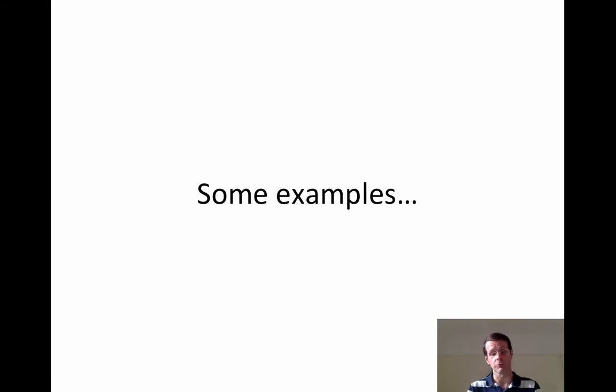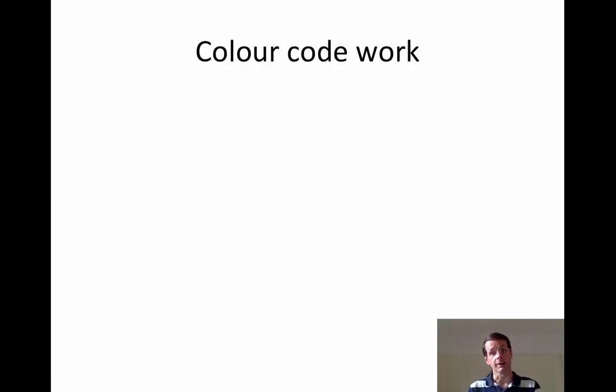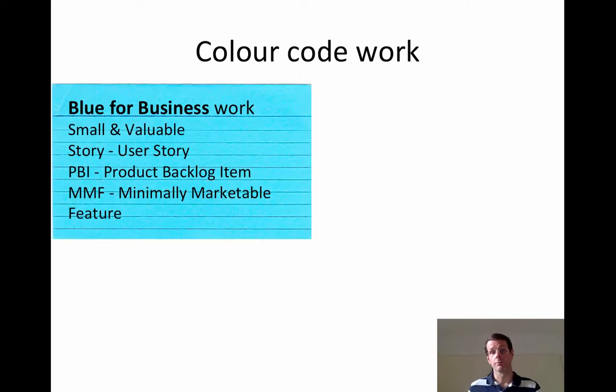As I said, here are some examples. I like to color code work. So I put business-facing work on blue cards. Blue work is something that means something to the business. It has business value, business benefit. We try and keep these pieces of work as small as possible. Some people call them stories, some people call them user stories, some people call them product backlog items, PBI, or minimally marketable features, MMF, or whatever you like. Quite often I just call them blues. These are pieces of work the business wants to deliver some benefit.